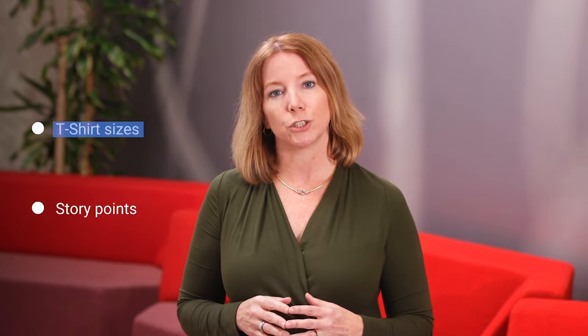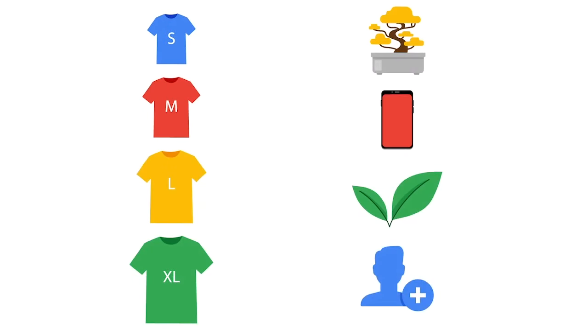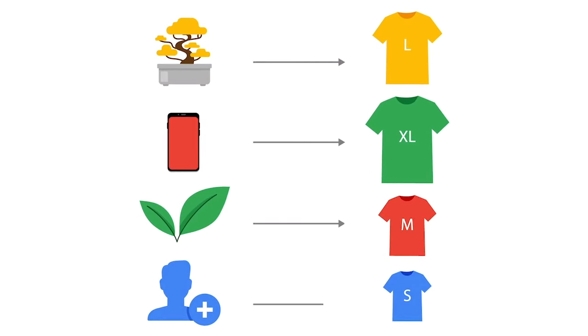There are two common relative estimation methods: t-shirt sizes and story points. With t-shirt sizes, the team picks one backlog item that seems about a medium-sized workload and calls it 'medium.' Then they take another item, compare it to the medium, and ask: 'If that first item was a medium, what size would I give this one?' They repeat this for each item on the backlog. For example, with four Virtual Verde backlog items — adding bonsai trees, creating a mobile app, launching a new logo, and creating a new account page — the team decides launching a new logo is their medium and compares the rest to it.